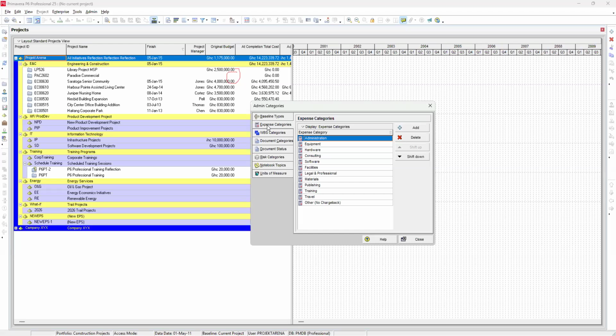Normally, when it comes to a project, the cost of an activity is a function of the resources assigned to the activities over the time period the activity will be performed. But some of these costs are not necessarily recurring or variable costs. They are one-time costs, so we treat them as expenses. So we need to define the kind of expenses we will be incurring on our project.